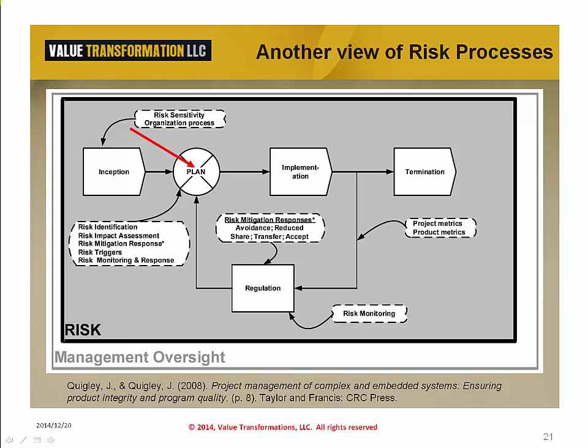To know when we need to deploy the response actions, we must identify trigger points or associated metrics. We will execute the project taking samples of project and product performance, many of which we have associated with our risk management. We will compare these measurements to what the project defines as acceptable or good. Those project or product attributes that are outside of the operating boundaries we desire or trending toward those outward will necessitate a response. The range of possible responses will be discussed later.